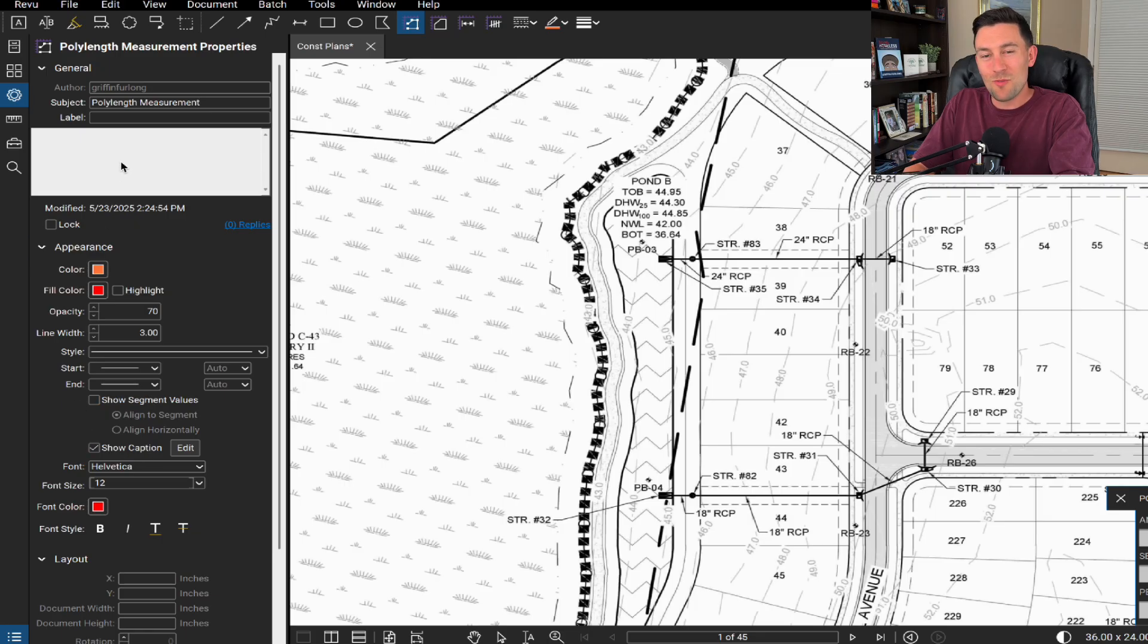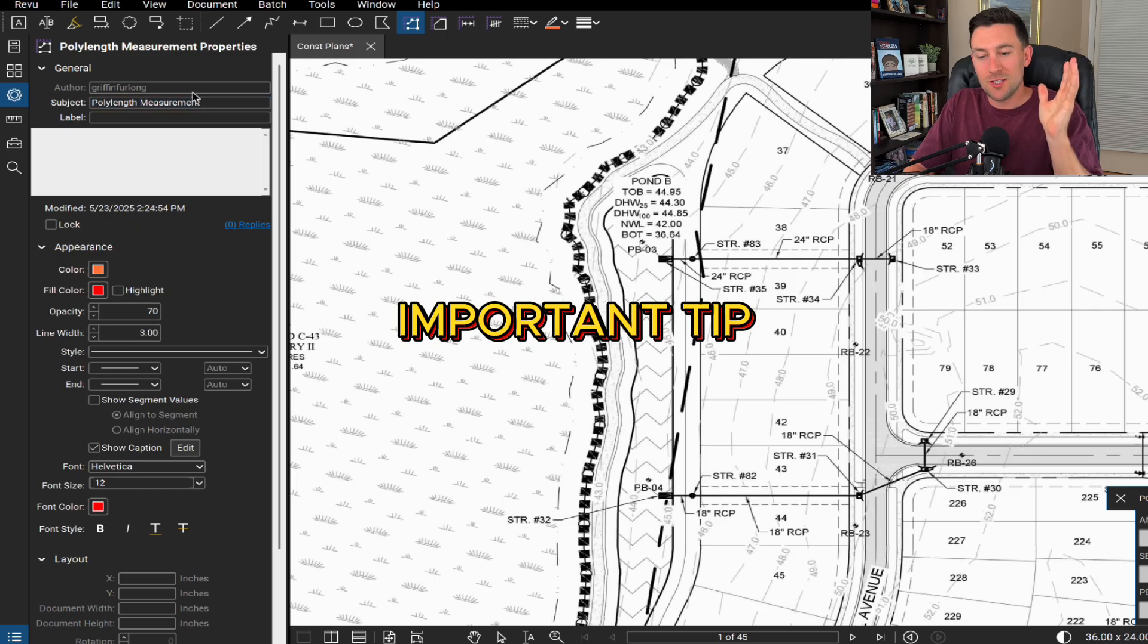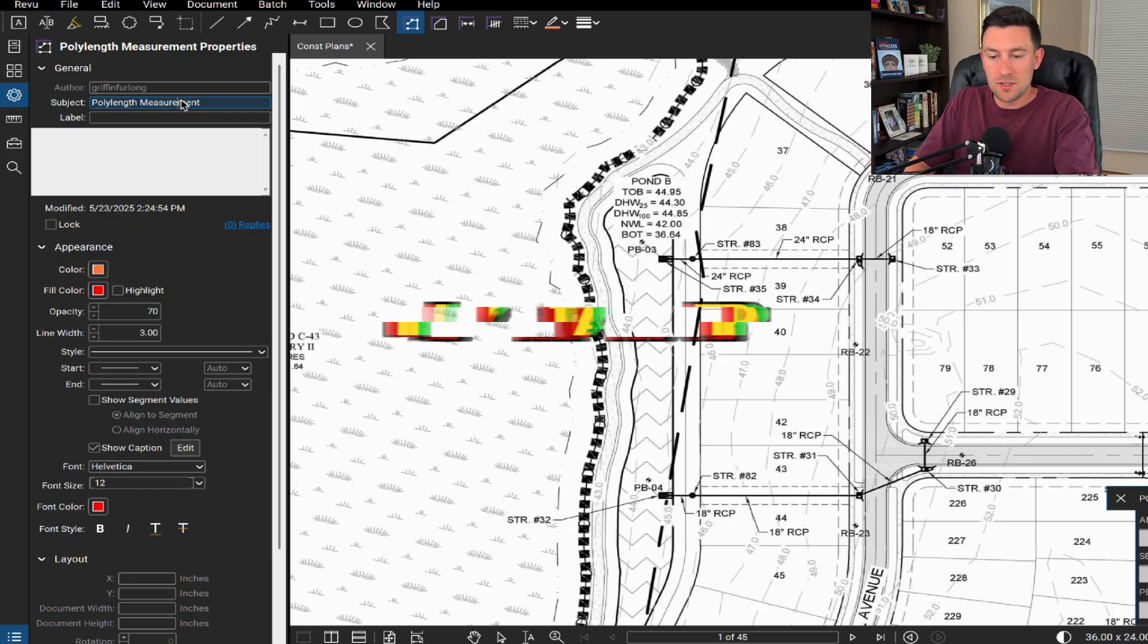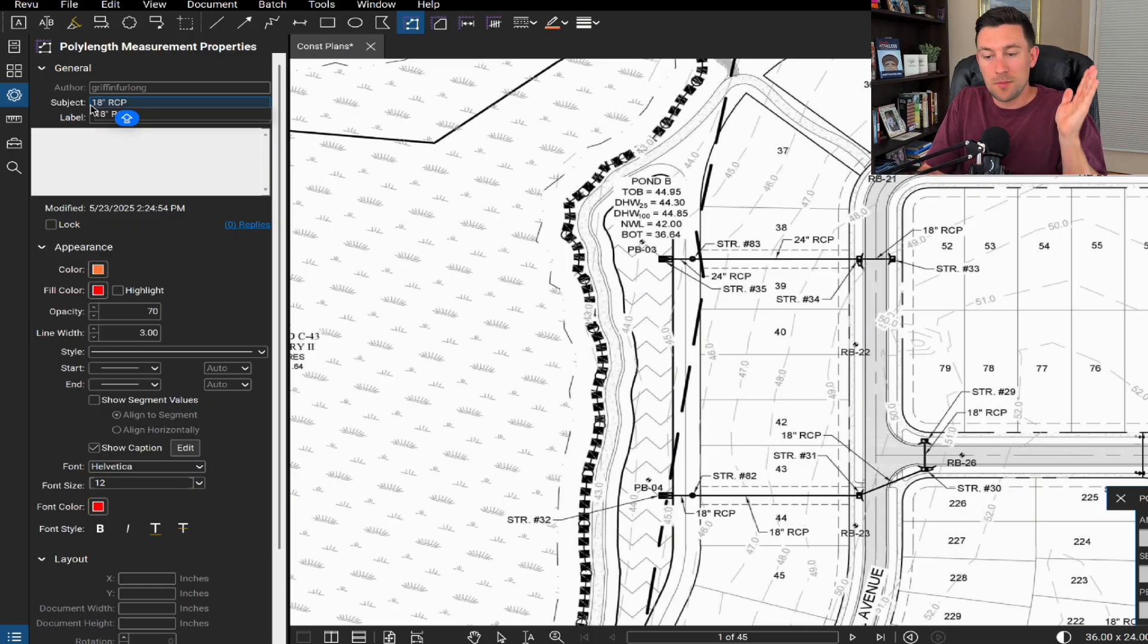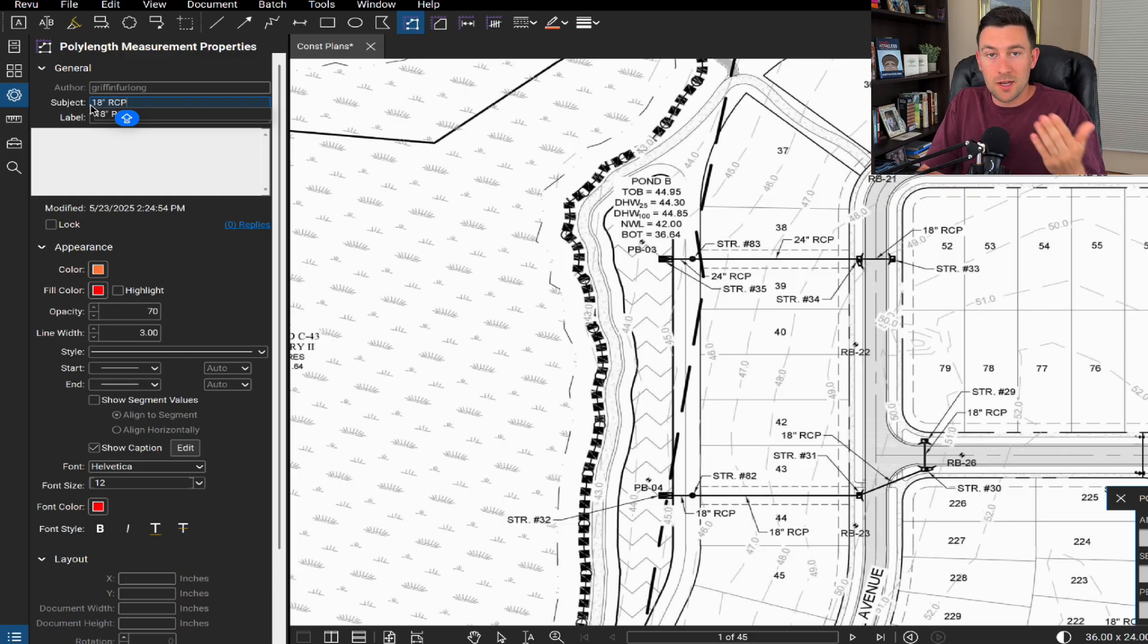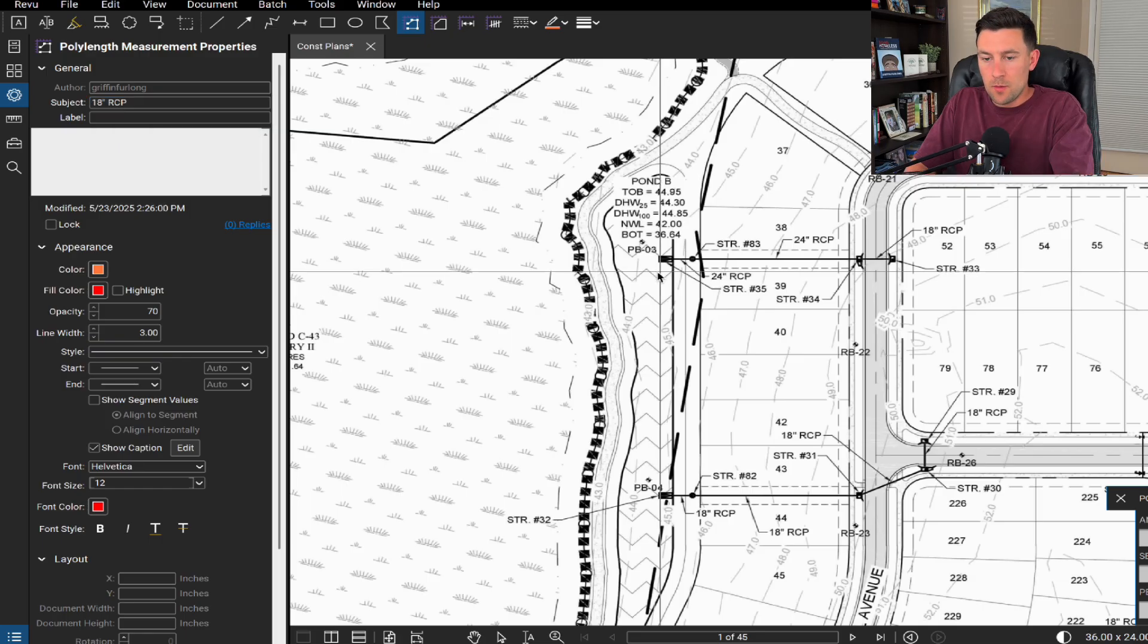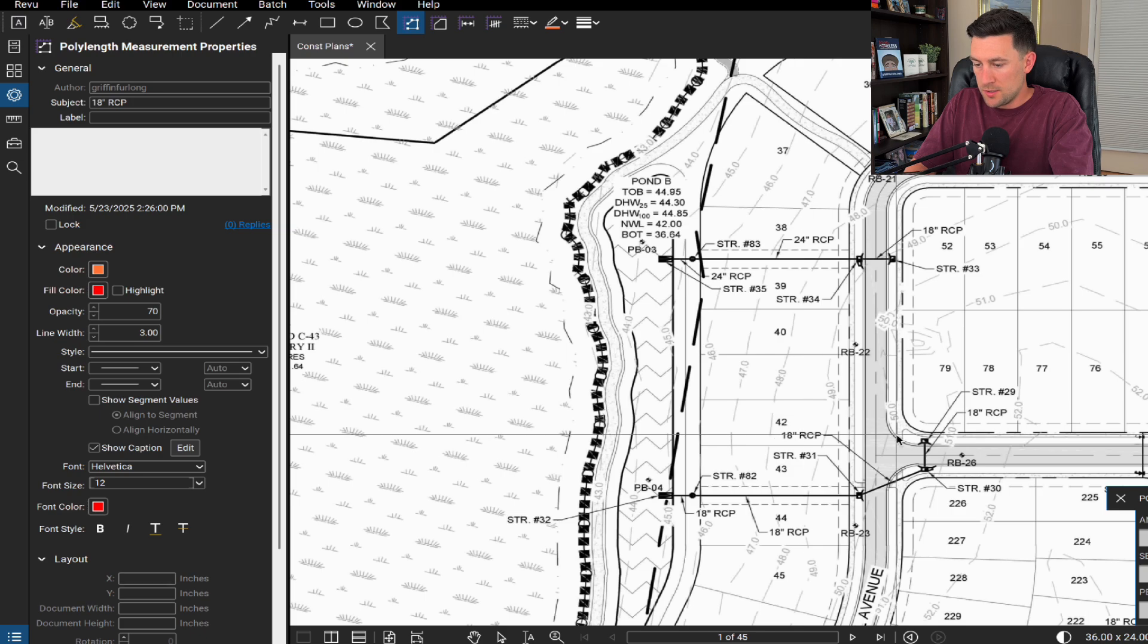Now the most important thing with this and you have to pay attention, do you see this subject up here? I want to change this to 18 inch RCP. If you fail to focus on this step, you are going to have to do a whole bunch of work to reorganize your quantity takeoffs. This subject is going to correspond directly to a legend that we're going to build. All right, now that we're ready to quantify some of the 18 inch RCP, let's just go ahead and start getting to it.